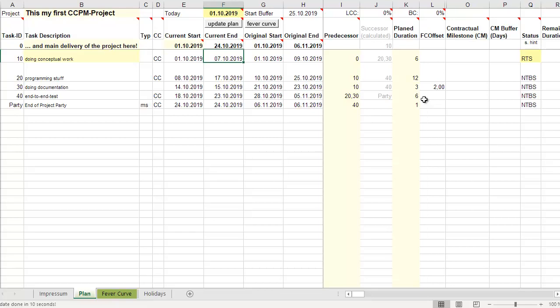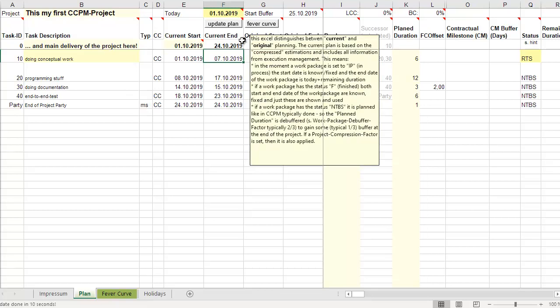If you set a work package to ready to start, that means planned, the Excel takes two-thirds of the duration and does the planning like a normal plan. If you put a work package into process, then already one date is known, the start date. In this current plan, the start date is used as it was given. The end date of a work package is today plus the remaining duration estimation. If something is finished, then the Excel takes the start and end date like it was when you set it finished. The consequence is that this current plan is changing every time you do execution management. But this is the project plan how it is in reality.